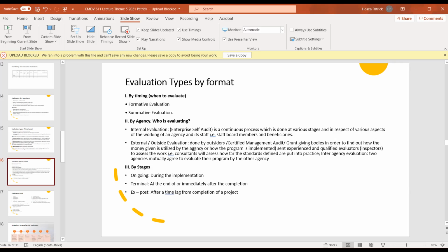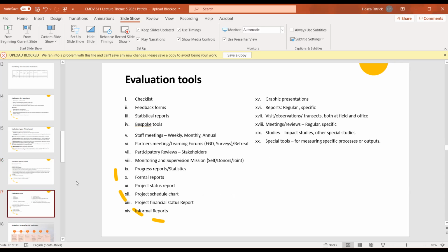What we're going to be doing is that maybe 2 years down the line, we go back to KZN and evaluate what is the impact of our project 2 years down the line. It is expected that the 100 people we have trained should have trained possibly 1,000 people. So you see, we can evaluate and say, okay, now we realize that we trained 100 people 10 years ago, but now these 100 people have trained 500 more. So you see, we can look at that project in the long term, right? So that's what we do at evaluation stages, looking at impact.